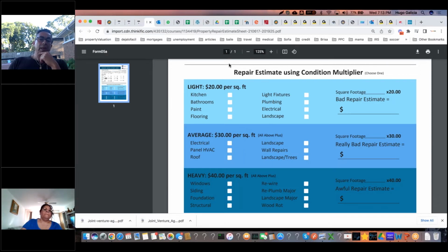But again, you never want to pay them up front, because some contractors say, okay, to start the project, we're going to charge you 30% up front. It's like, why are you going to charge me 30% up front? I mean, you're not buying the materials, right? So that's the key. You don't want them to buy materials, because otherwise they're going to charge you up front. So if you pay them 30% up front, you run the risk of them doing nothing, and then you need to chase them, right? So you don't want to be in that position. You always need to be in arrears. Always, always. You pay them once they've completed the milestone.